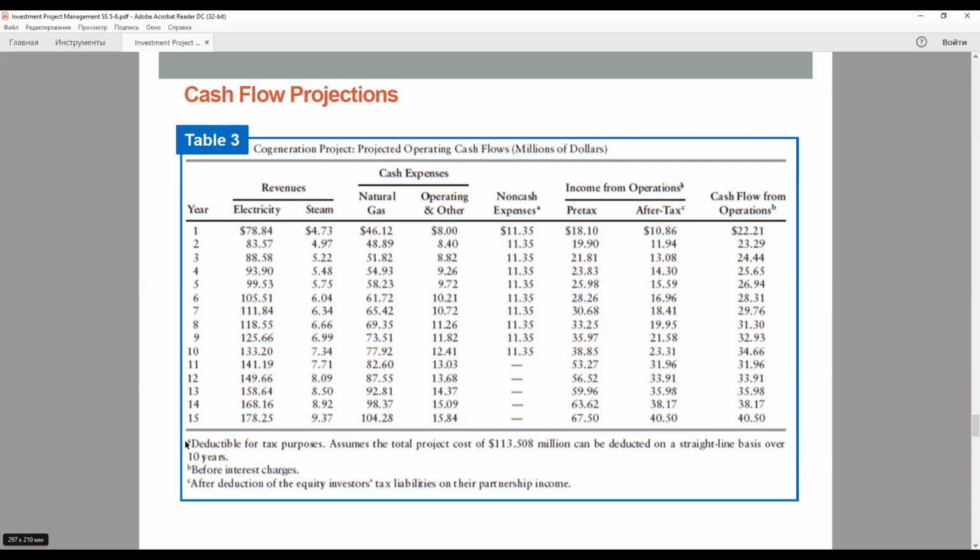And please be aware of such financial tricks that can be used. So if you increase only the inflation driver, even if it is the same both for revenues and costs, but you do not adjust other drivers used in a calculation, that's not a sound approach.